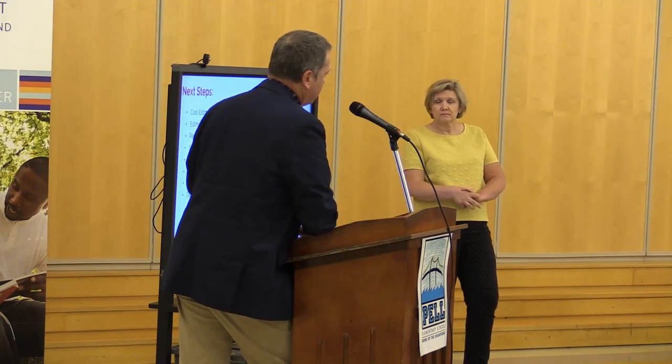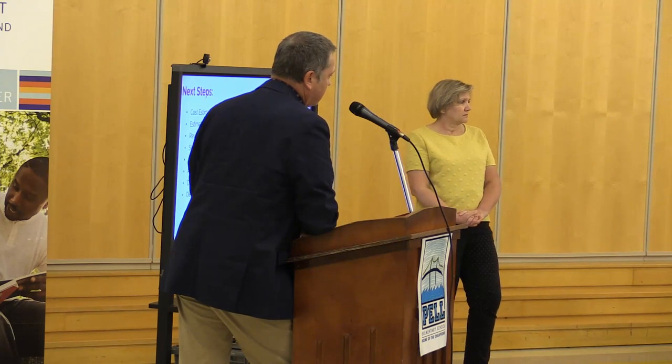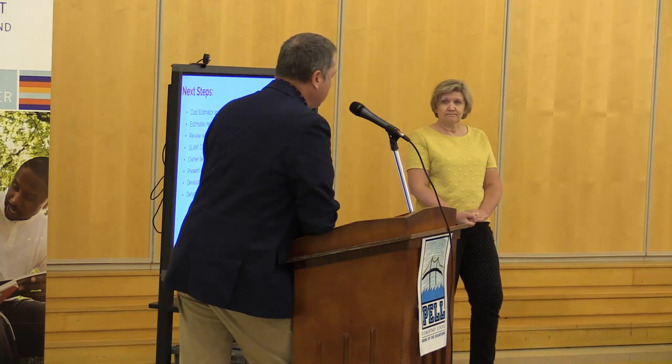We know there is still significant pressure in the industry on costs. I think you're still seeing it on Bell. In some cases, steel deck, if you didn't order it ahead of time, has a 6-month lead time. Roof insulation, 6-month lead time. I don't even want to talk about air handlers if you haven't gotten them in the queue. There's a lot of pressure right now, and it is labor force pressure more than material cost pressure. There are just no truck drivers to drive this stuff around. It's become a nightmare for the industry.